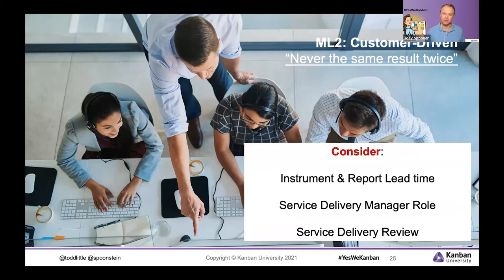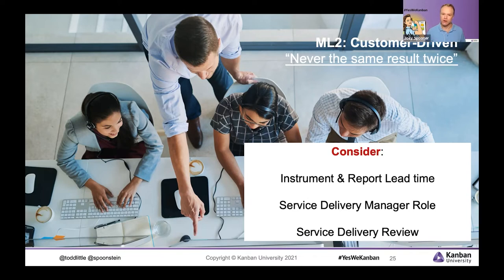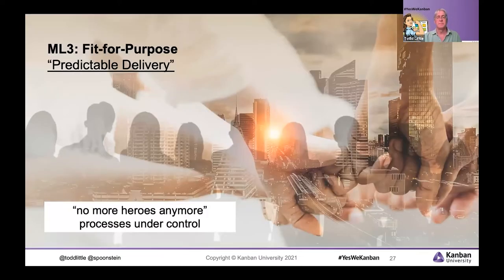To improve from maturity level two, set up lead time tracking — how long it took to start the work, finish it, and get it back into the customer's hands. You might also have someone take on a service delivery manager role, focusing on making sure work moves through the system without hanging around too long. We also grow our feedback meetings into what's called a service delivery review, asking: how's it working for our teams, how's it working for our customers, and are we really hitting the mark for what they want? If we are, we're moving toward being fit for purpose.